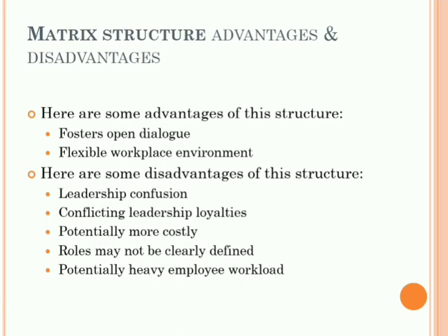On the other side, in a project-based organization, as a project manager you will have more positional authority. The further right your project sits on the spectrum, this doesn't mean that you can just command others, but you will have more formal authority for getting project tasks completed. From the resource availability perspective, you will also have greater control over your project resources, since they will be more likely to report directly to you and not to a functional manager.